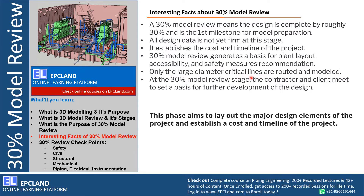The 30% model review generates the basis for plant layout — how equipment will be located, how accessibility will be there, how safety measures are recommended, and many things related to operability and maintainability are finalized at this stage. Only the large bore critical lines are routed — for example, the overhead line from compressor, boiler inlet/outlet, those lines which will impact the overall layout and equipment location. At the 30% model review stage, the contractor and client meet to set a basis for further development of the design. This phase aims to lay out the major design elements of the project and establish a cost and timeline, which is why 30% model review has very good importance in the overall design phase of any project.